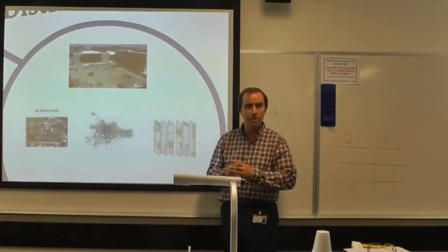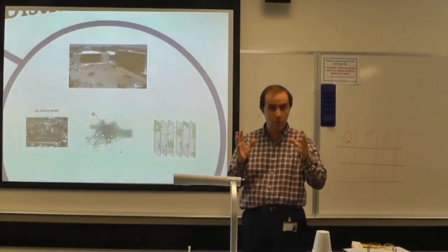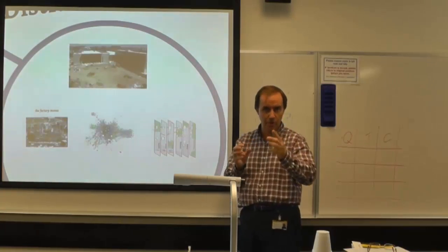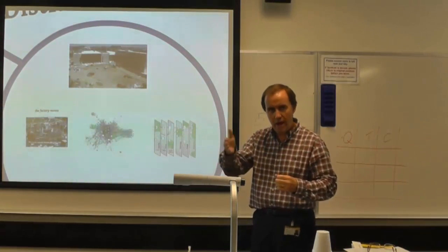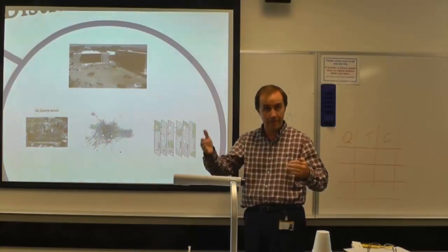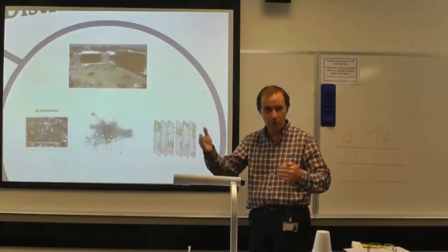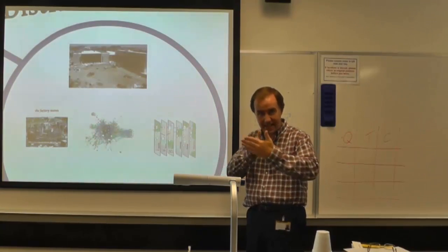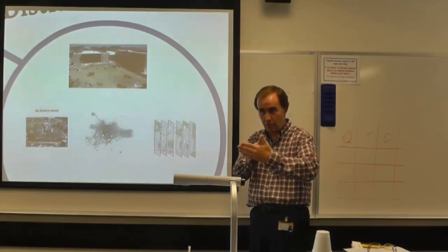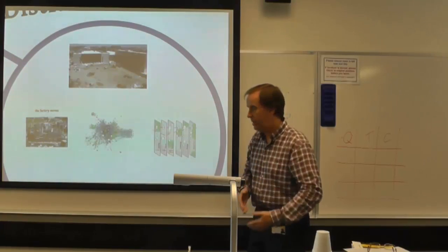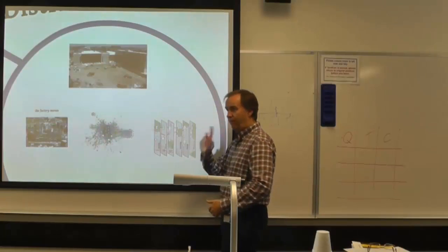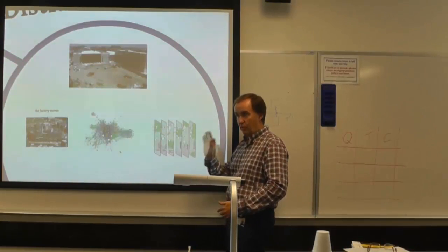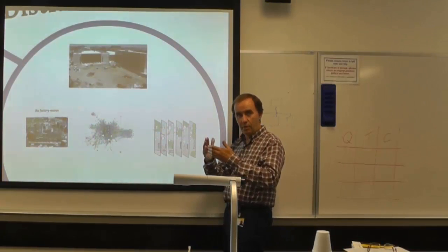So every project you do, along the way, you have a mechanism for reporting problems, blockages, things that are getting in the way of you doing what you need to do. And those things need to be fixed so that next time we run the system, we don't get a blockage.